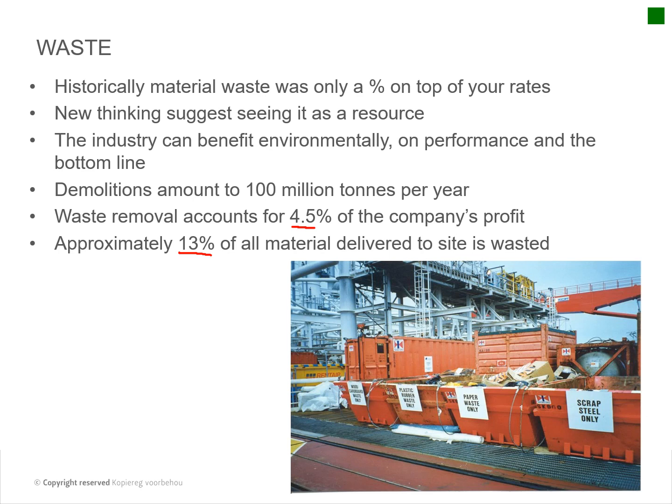The other thing is if you plan your site such that you use some of the originally constructed building as storage, you can save that cost as well. So there's a whole lot of practical items that you can think of to save money by utilizing your progress on site and just being effective.